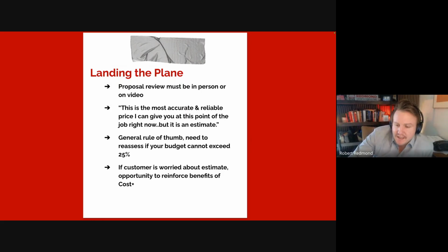And I'm thinking we may need to do another one of these that's more into the mechanics of actual cost plus. The way that we do that is we have outlined a very specific system to update across all jobs what each expense is daily, because there's only so many places where those expenses will be reported, right? It's either going to be in your Home Depot account, or a PO in Builder Trend, or in a bank statement or QuickBooks or something like that.